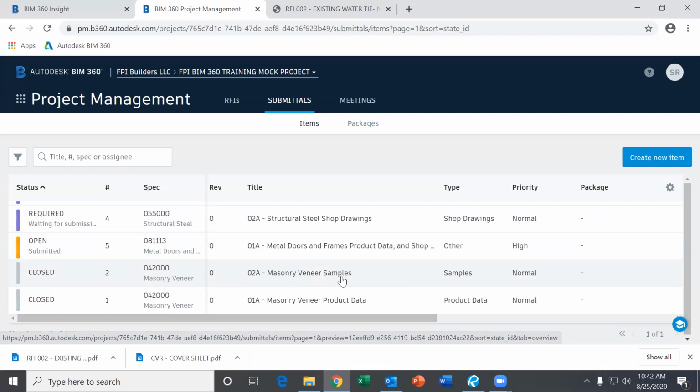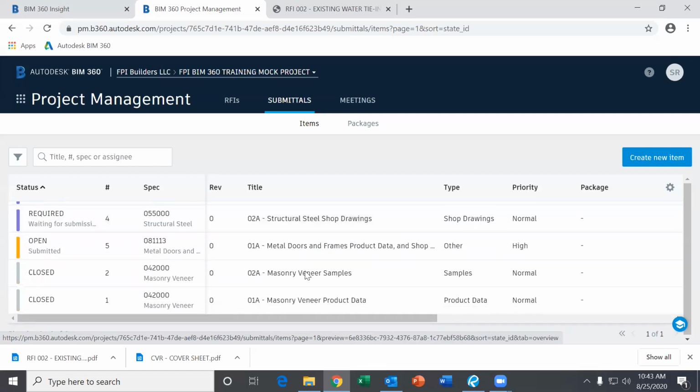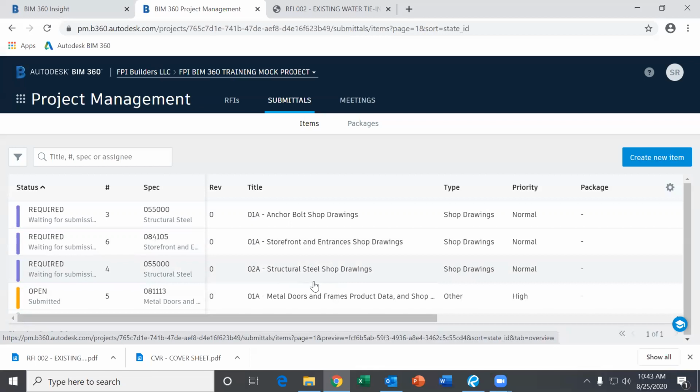A lot of the HVAC and plumbers and electrical have multiple spec sections. We ask that you break them up by each spec section and what it's asking for. So the required submittals are created on our end in BIM. Yes. The only thing they're required to upload are the PDF documents attached to that.